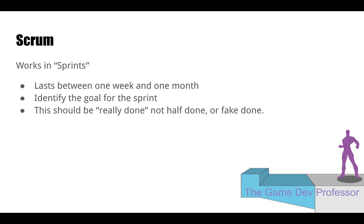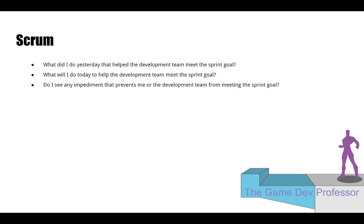Scrum is generally designed in small sprints — goal periods of one week to a month, with two weeks being typical. A month is a really long sprint. You identify the goal that needs to be done and make sure your team reaches that specific goal. For example, getting level one completely polished the way you'd want it in the game. If it ends up boring and not fully finished, you'd talk to the team and say 'hey, we did not meet our sprint goal here.'